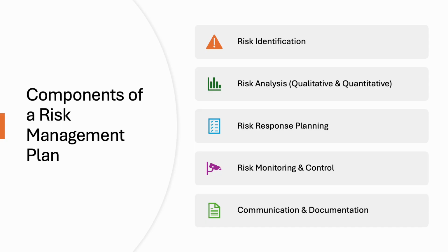Risk response planning defines specific actions to reduce or leverage risks. For negative risks or threats, typical strategies include avoidance, mitigation, transfer, or acceptance. For positive risks or opportunities, strategies like exploitation, enhancement, and sharing encourage the team to capture potential gains. In this project, for example, mitigation may involve enforcing stronger password policies or encrypting training data, while exploiting may involve leveraging increased compliance awareness to improve organizational reputation.